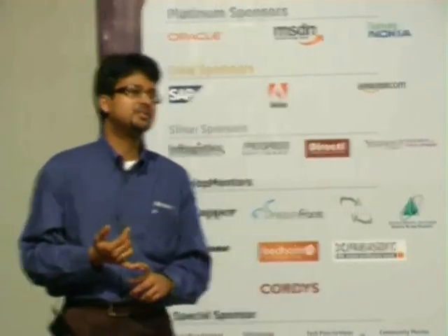If I find a bug at design time, it might cost me $10. If I find it at dev test time, it might cost me $100. But if I find that bug in production, that is hell to pay. And it's not just the $1,000 it might cost, but the brand reputation of your company. Imagine all of those news snippets you've heard about various online portals going down. So there's a lot at stake when an application doesn't perform in production. So how do you bring a lot of that quality testing earlier in the process?